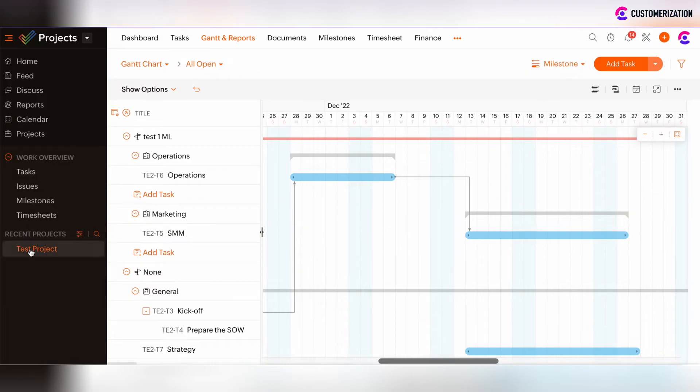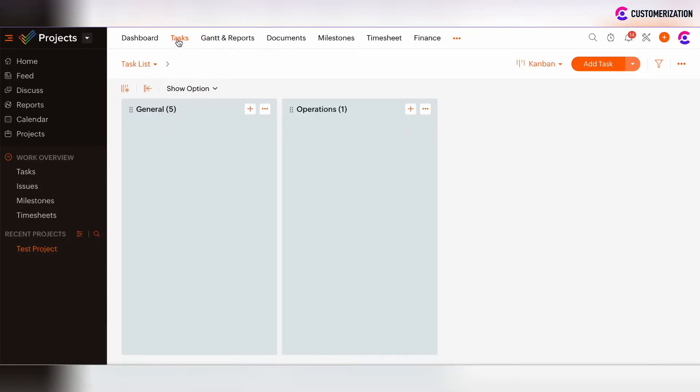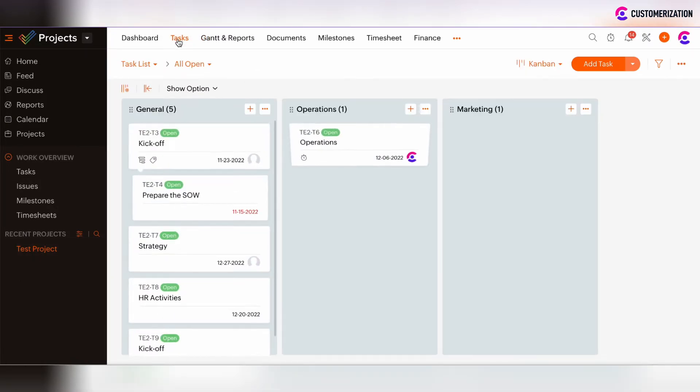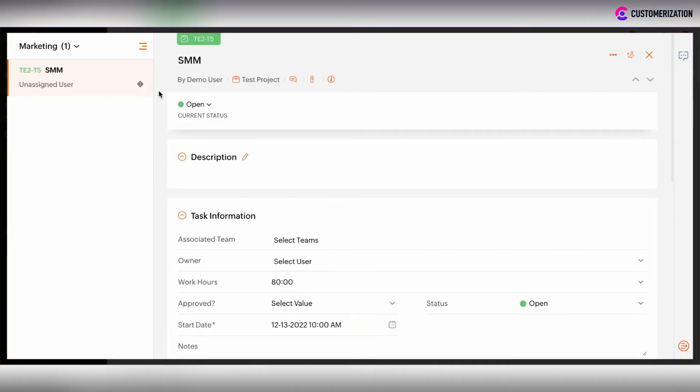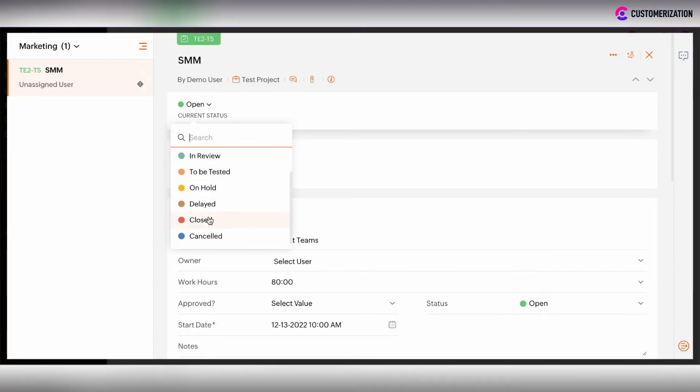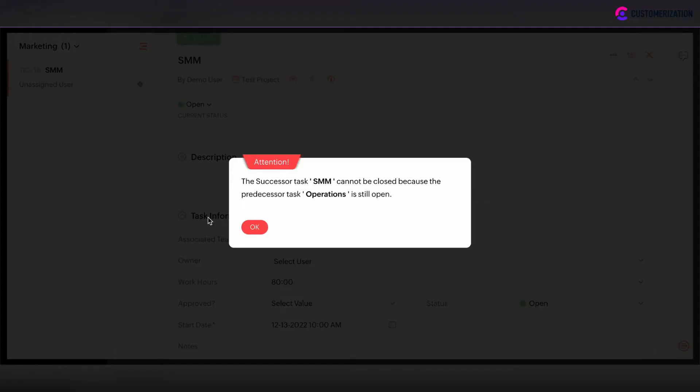Let's show this example on the real testing. So now kickoff is open, operations is open, and I would like to close the final task without closing the first two tasks. I click closed and now I see the error message. The successor task SMM cannot be closed because the predecessor task operations is still open.